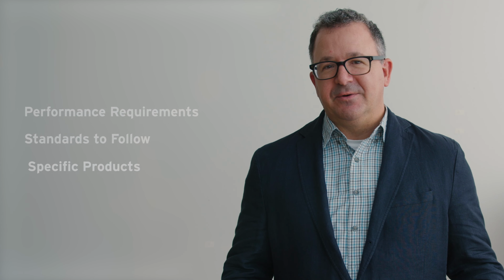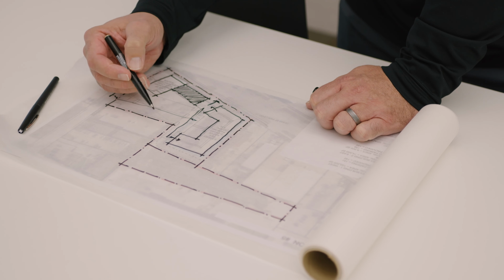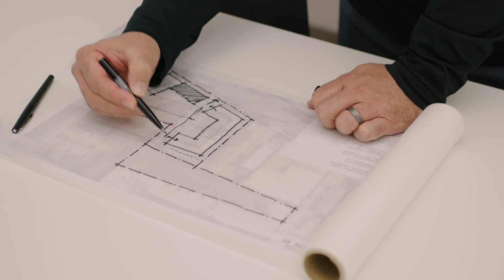Ideally, you'll finalize the overall design before the CD phase begins. Making changes will require your architect to revise drawings and specifications at a crucial time. Since building systems are connected, a change can create a ripple effect throughout the documents. Your architect will also need to coordinate all changes with any consultants involved. In short, changing the design during the CD phase can delay the project's timeline, so anticipate and plan accordingly.